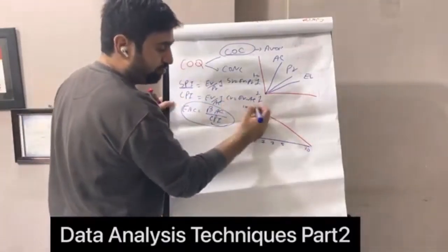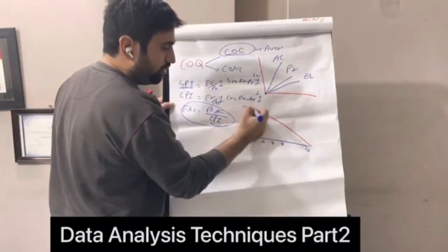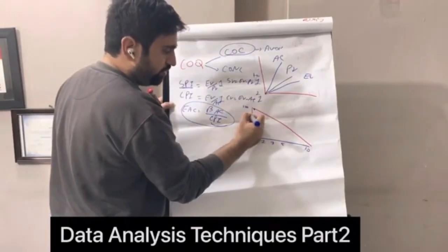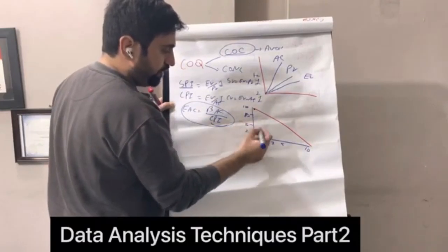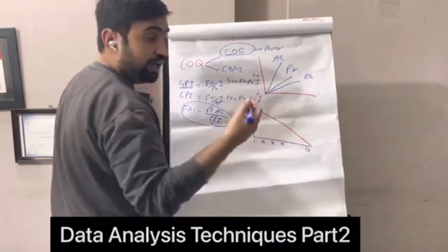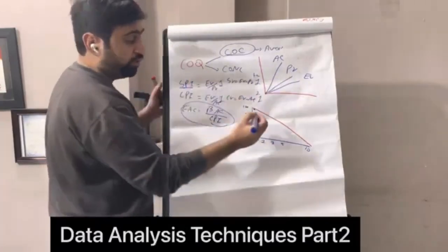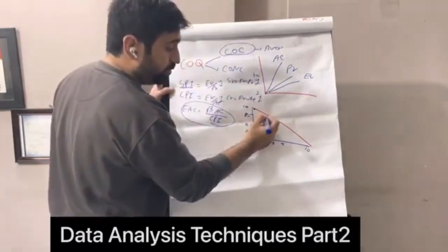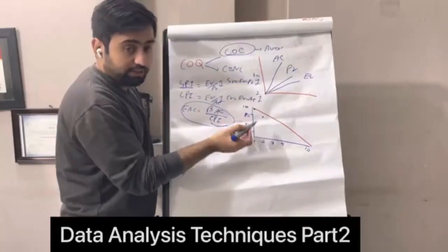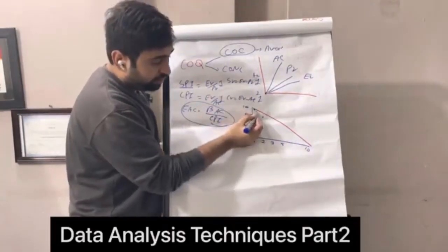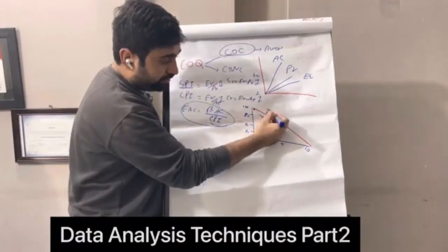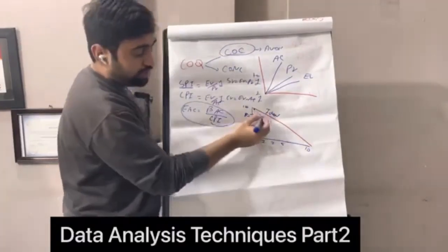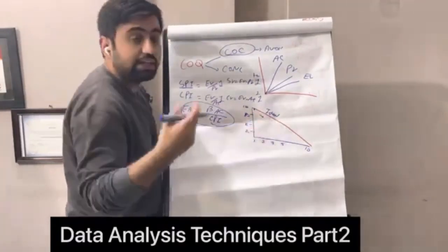You started on day 1 as planned. I'm putting here 80, 50, 20. As you perform on day 2, you are doing very good. This is the actual burn down, and this is ideal. When the actual burn down chart is on the downside, it's a good thing.